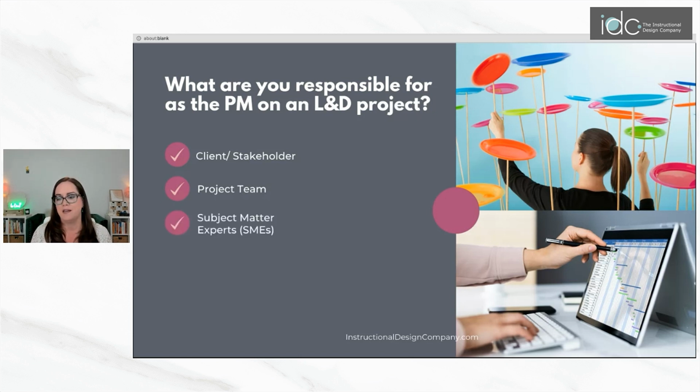collaborating, right? And I did see that someone mentioned scope creep over here. I should have put that on here and I didn't, but that is a huge one. Yes, you are absolutely responsible for managing scope creep. And for those of you that are new to project management and may never have heard of scope creep, at the beginning of the project, we all align on what is the scope of the project? And when we say scope of the project, we simply mean what are the requirements of this project? What am I agreeing that I can create and deliver by this deadline?